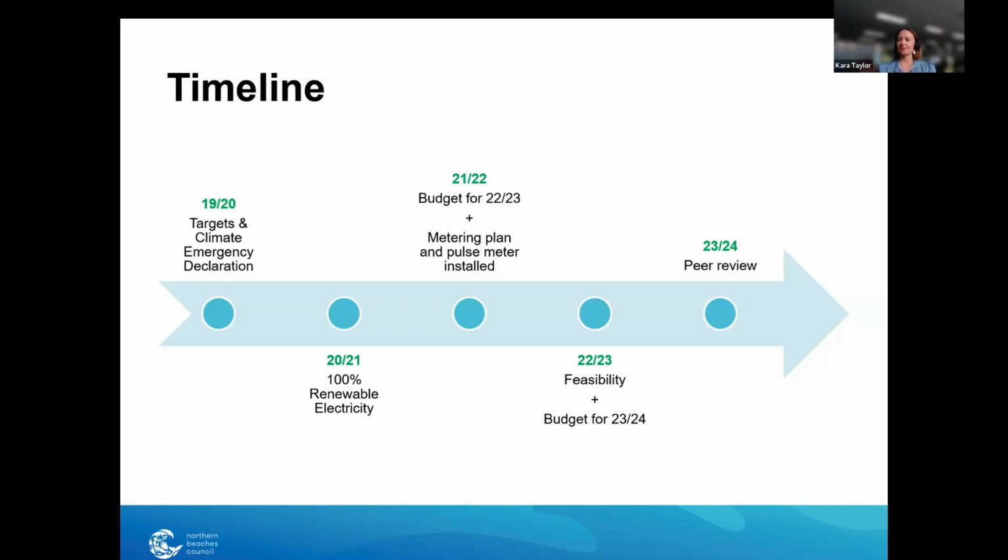They know how to answer the questions for maintenance and where everything is. But that was really valuable. We had about 10 submissions to our RFQ, and they were all good quality. It took us longer than we thought it was going to do the assessments, because they were good quality. So we got our internal HVAC specialist to come along to give us some engineering advice in that process as well, and refine the assessments.